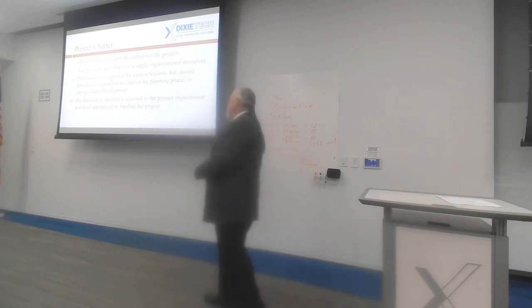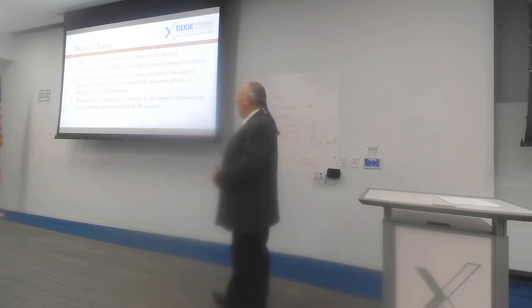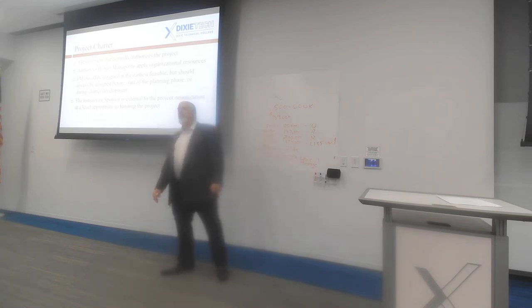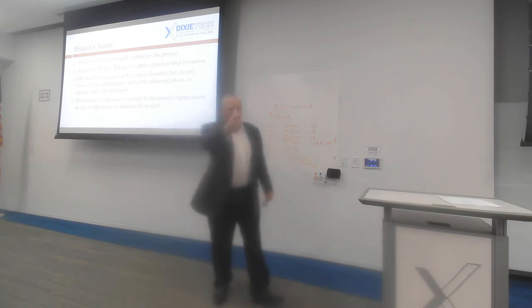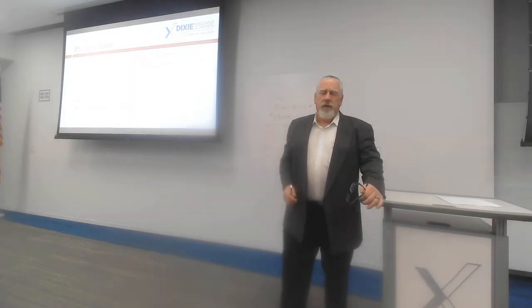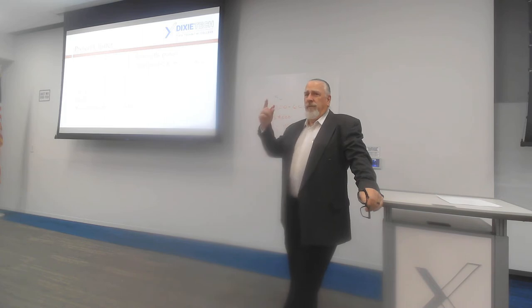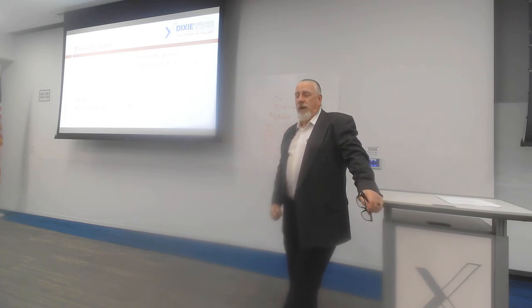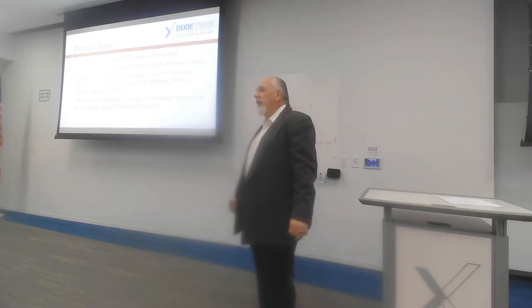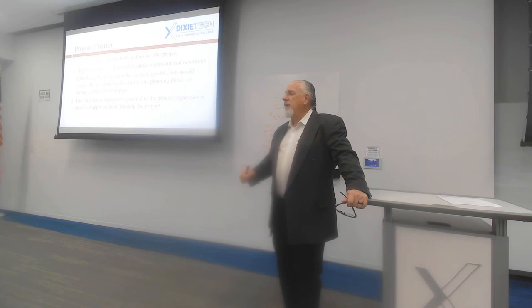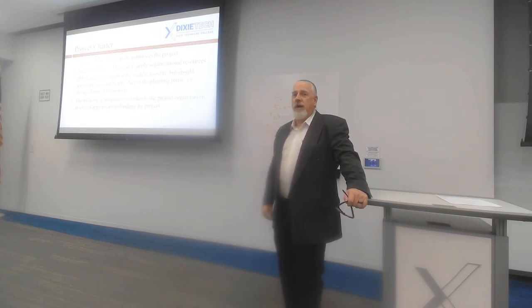We want the project manager named. When we're doing a project in the medical arena, just to give you an example, we talked before class about some work I'm helping a company with right now. The first thing on a project for the United States anyway, when we are going to introduce a medical device or a new drug, we have to name the project manager to the United States Food and Drug Administration.